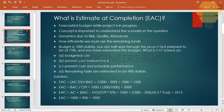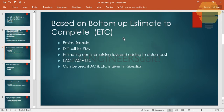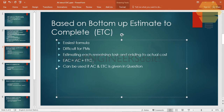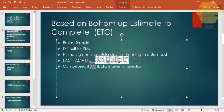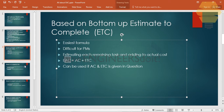There are four scenarios presented in the PMBOK. The first one is when we are given the Estimate to Complete (ETC). This is based on a bottom-up estimate to complete. The formula is the easiest one, though it is the most difficult to implement for PMs, because the PM has to estimate all remaining tasks from bottom-up. If the actual cost and ETC are given, the formula is simply: EAC = Actual Cost + Estimate to Complete.